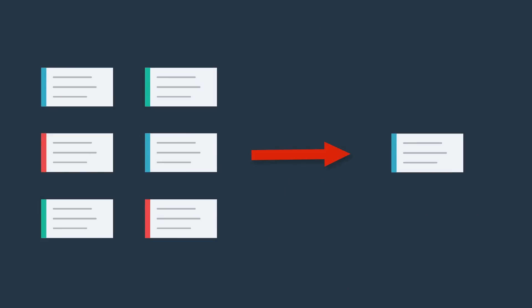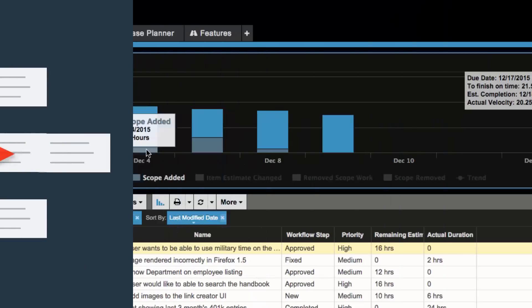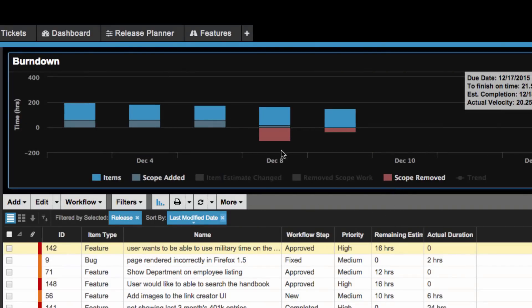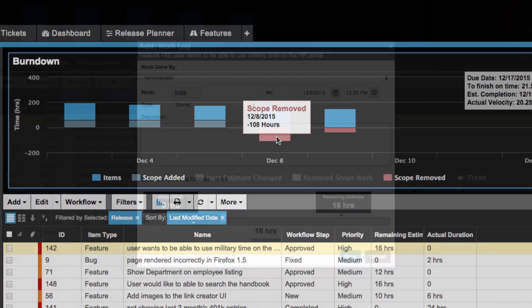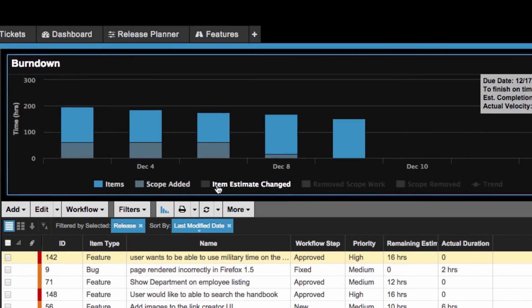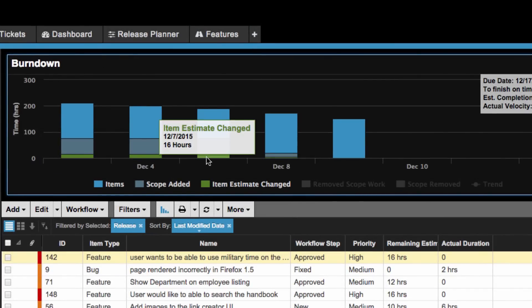Similarly, if you remove scope from your release, then you have the option to view work that was removed and have that reflected in your burndown. If you log a work log and determine that something will take longer than expected, your update will show up here as a series in your burndown chart. This applies to any re-estimations you make to active items assigned to your sprint or release.